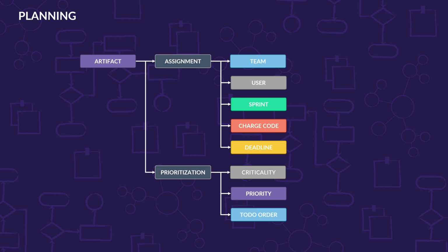Finally, separate from the priority, I could have two things that are both priority 1, and I may need to turn around and say, you know what, I want to do one before the other, even though their priority is exactly the same. So in addition to the priority and the criticality, we also allow you on every single artifact to specify the desired to-do order.